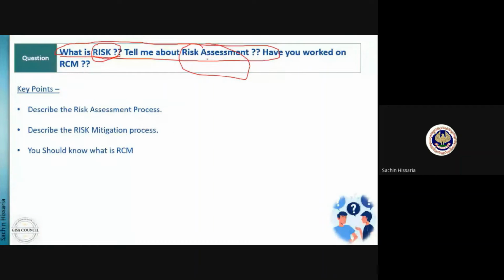Okay, I hope I have given you the entire picture of how you would answer the entire risk assessment process step by step: identifying the critical processes, identifying the threats and vulnerabilities, doing an impact analysis, then prioritizing the risks or processes, and then applying the appropriate mitigation controls. So this is your end-to-end risk assessment process. If you know the process, then obviously you can verify those processes as well. Then risk mitigation strategies also.